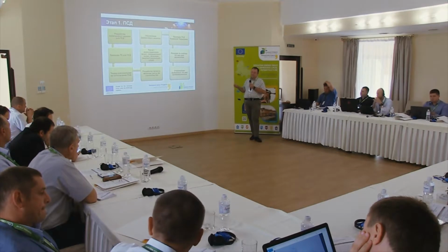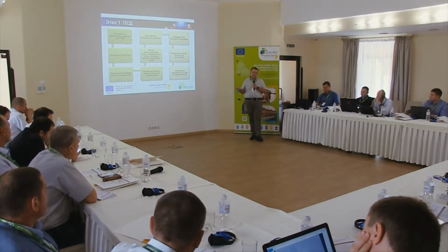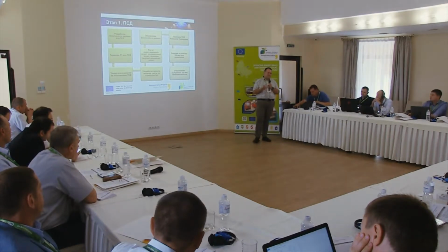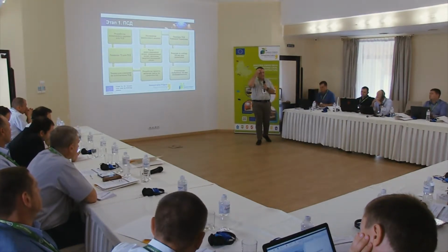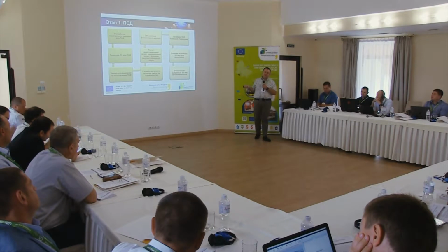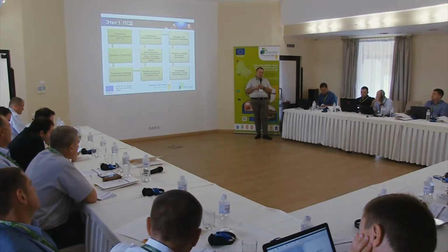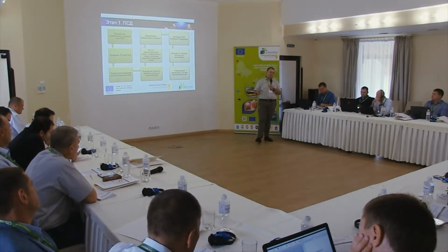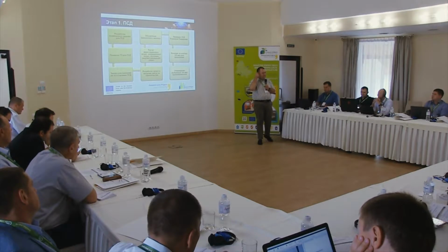So after you develop the draft design specification and estimates and you submit it for expertise, please calculate your budget once again, whether you have enough funds to implement all the measures at all the sites, or probably some changes should be introduced. One of the variants that was chosen by our project is stage-by-stage implementation.